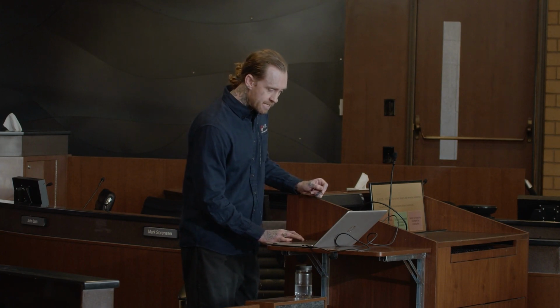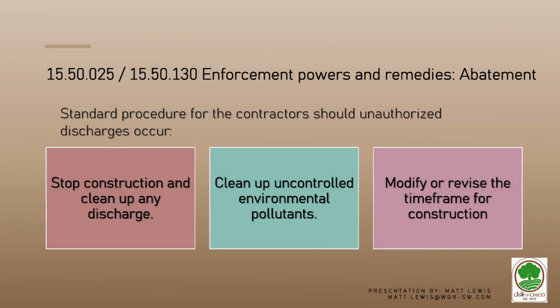And then you can require a new time frame and notify the Central Valley Regional Water Board, we're all here in Region 5, in writing within 5 days of the determination that the time frame requires revision, when all parties agree that the cleanup activities cannot be completed within the original time frame.